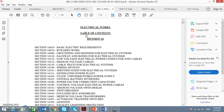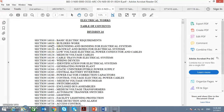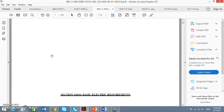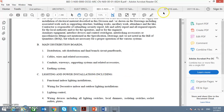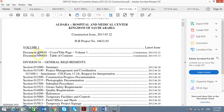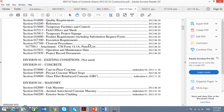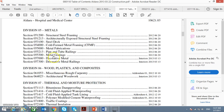Another project — this is for a project in Mecca, Jabal Omar — also done according to MF95. And another specification for Aldara Hospital: you can see section numbers like 000001 and 013233 — this is according to MF04. If you compare this to the generic specification, you will notice many sections have been omitted, like Division 2 — Existing Conditions — marked as 'not used.' Many sections are not used in a tailored project specification.